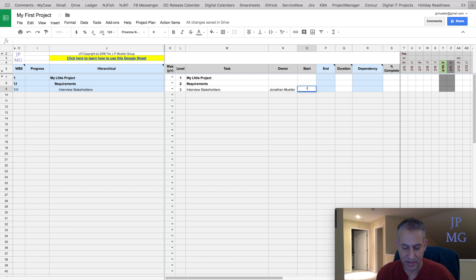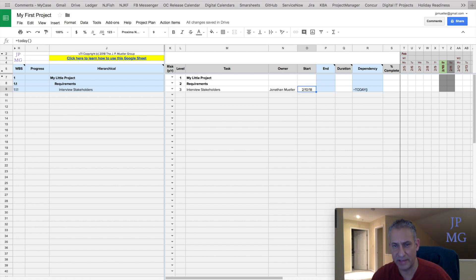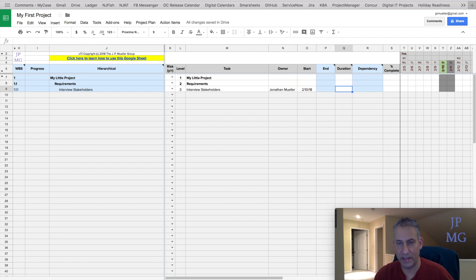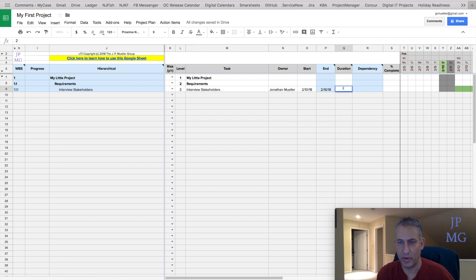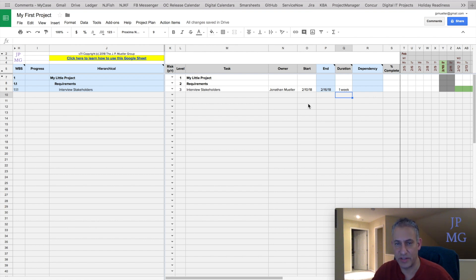Let's say this is going to start today, so I'm going to put the formula equals today. I could actually put a date instead — for example, I could put 10/13. Let's say this is going to take me a whole week, so I'm going to put one week for duration. It's automatically going to calculate the end date. It's smart enough to understand how to parse the units we're talking about.